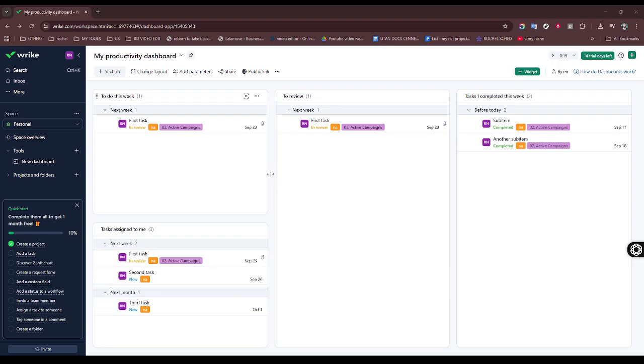identification of bottlenecks. To set up your Kanban board, begin by listing all the tasks that need to be accomplished. It helps to be as detailed as possible at this stage so nothing is overlooked. Once you have your task list, categorize each one according to its current status. This forms the backbone of your board, providing a comprehensive view of what needs attention.